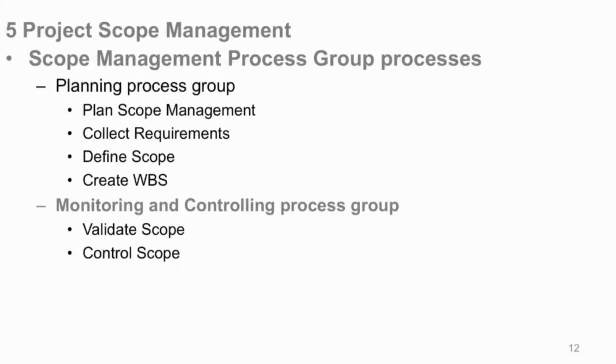Remember the life cycle of a deliverable? After it's produced as a deliverable, it goes into first quality, and then it goes into scope to validate the scope, and then it goes to the final deliverable. And also under monitoring and controlling, we need to control the scope to avoid basically scope creep, or to compensate for new requirements and get them into the mix.